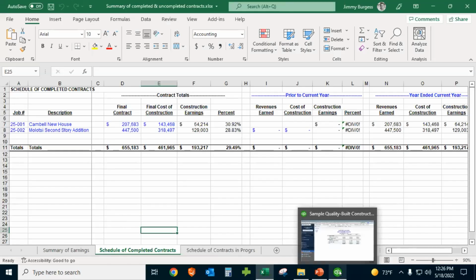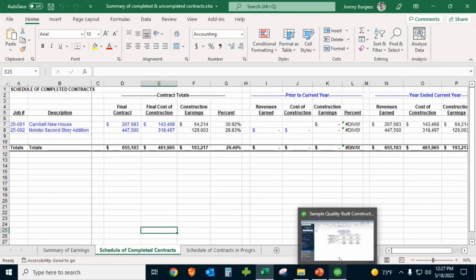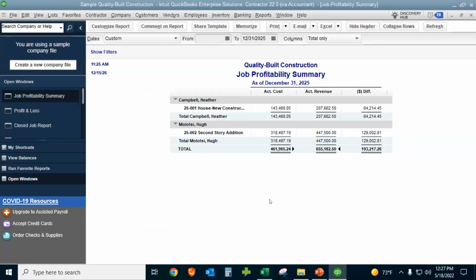That's especially important on those home builders that I talked about that code all their costs to the balance sheet. Because if we have a job that we closed out and we never go back and look at those jobs for costs, we could be leaving expenses on the balance sheet that we should be writing off. So as long as you're running some sort of report, a detailed report, like Jimmy showed you, that summary report by job for those balance sheet accounts and tying those out, you shouldn't be missing those. But if you're not running this report like that, you could be missing tons of jobs.